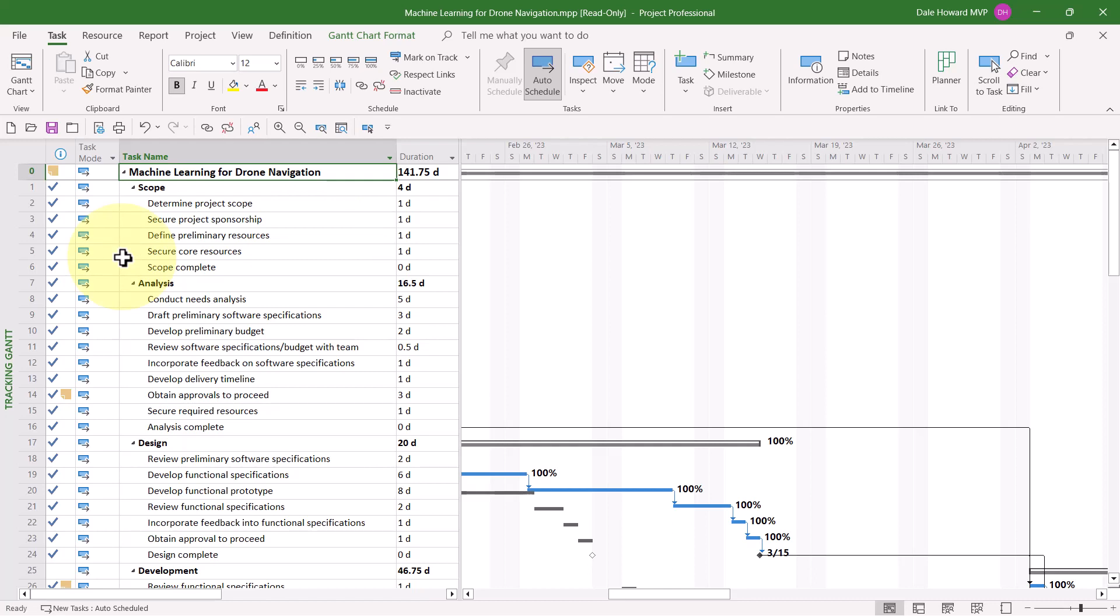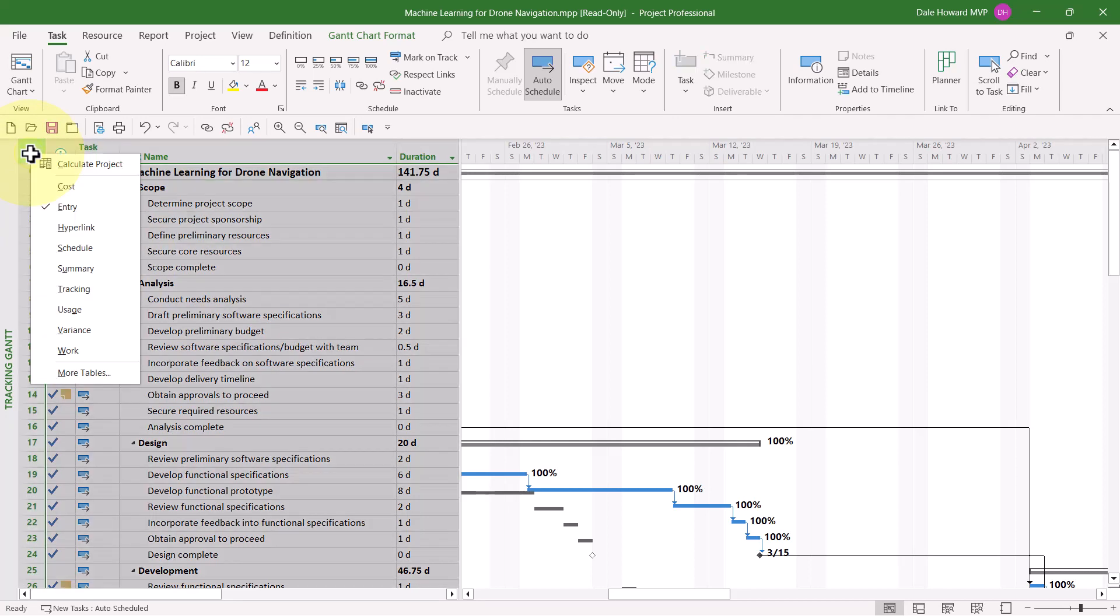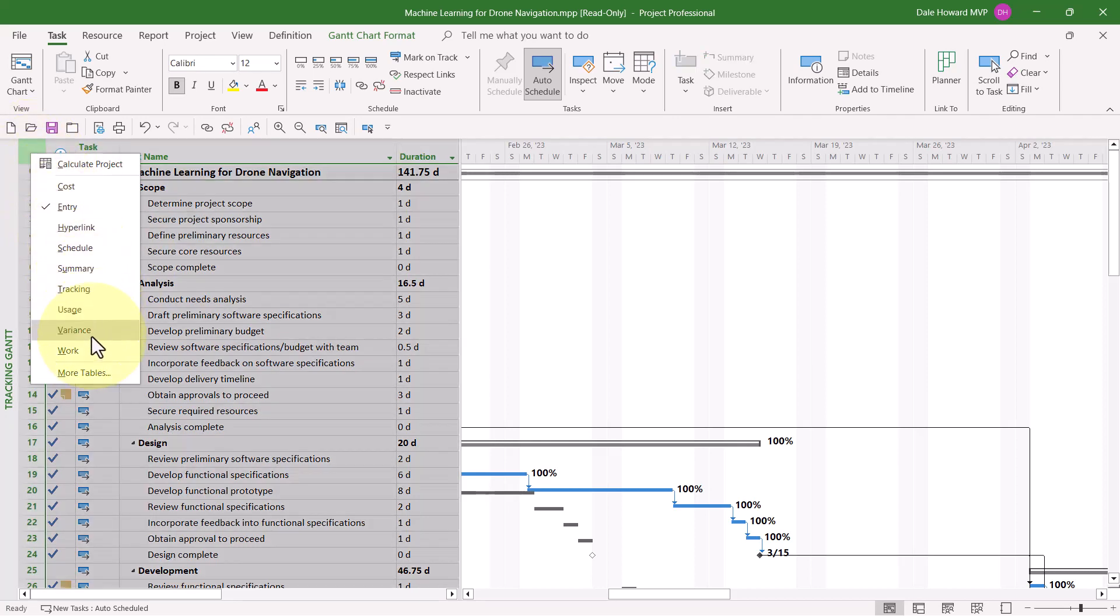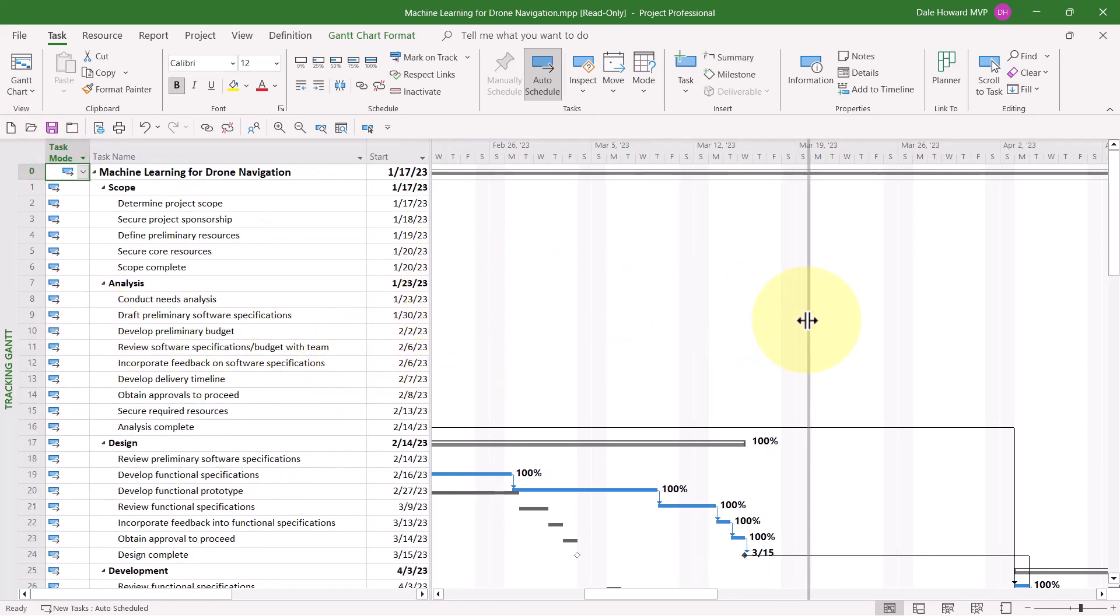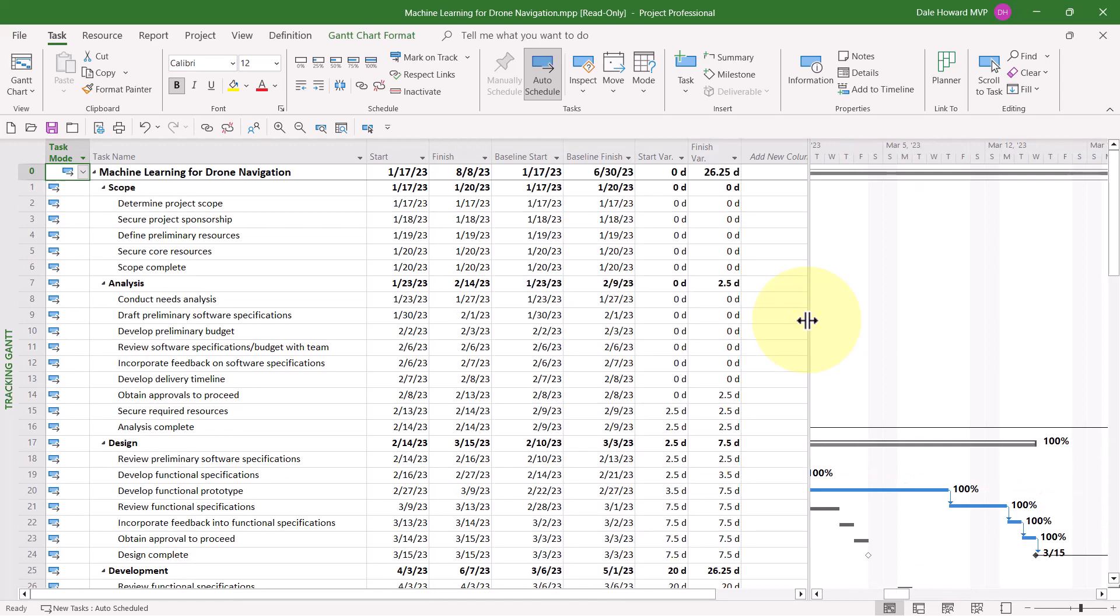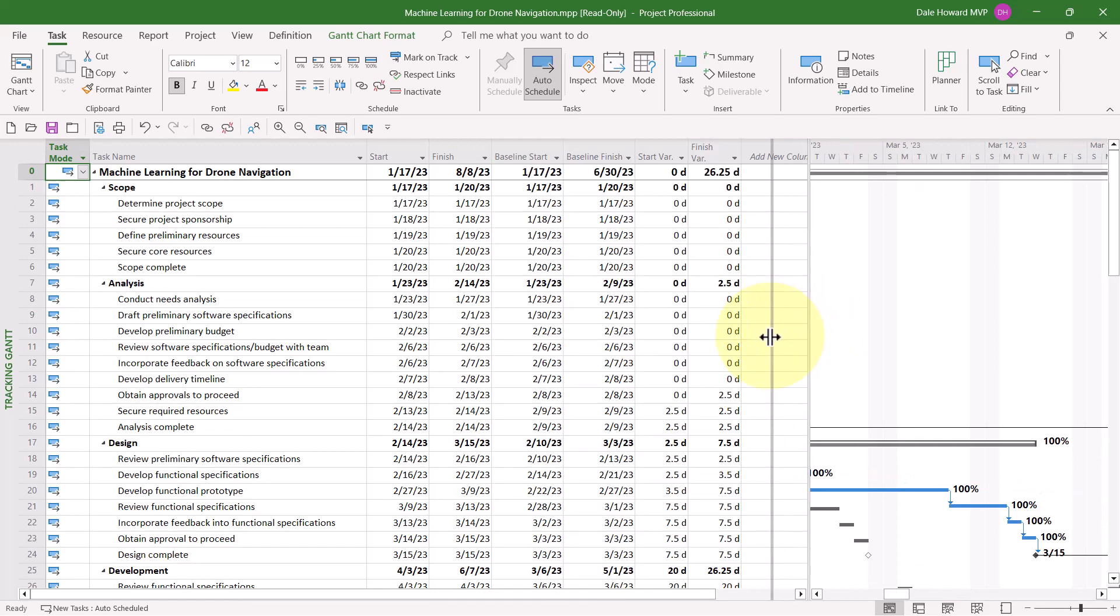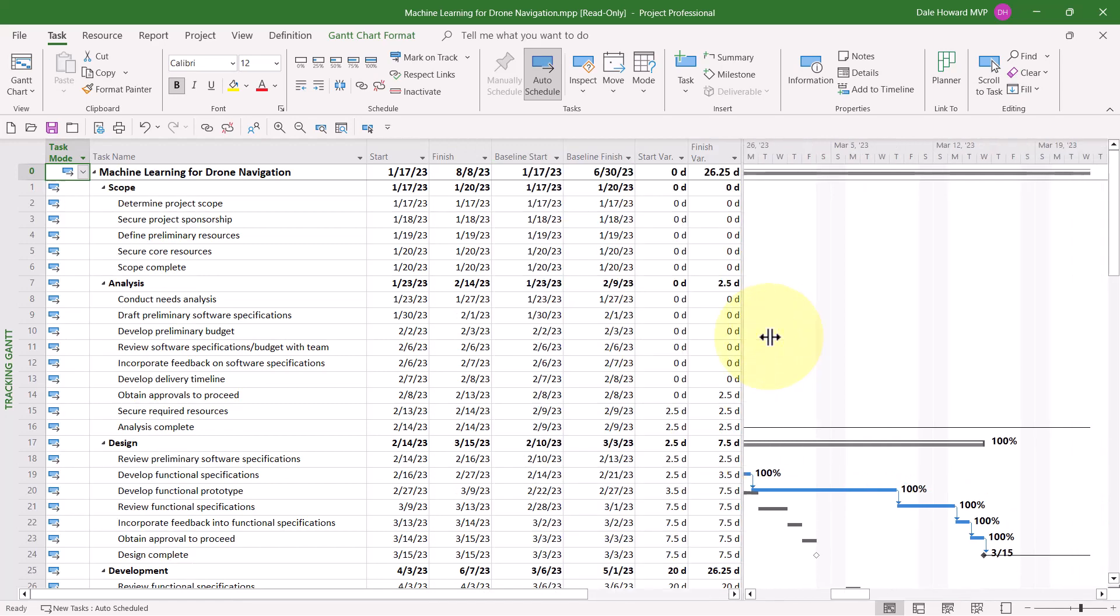And this leads us to the second location where we can analyze variance, which is the variance table. To display this table, right-click on the Select All button, and then choose Variance on the menu. Drag the split bar over to the right so that you can see the Finish Variance column.